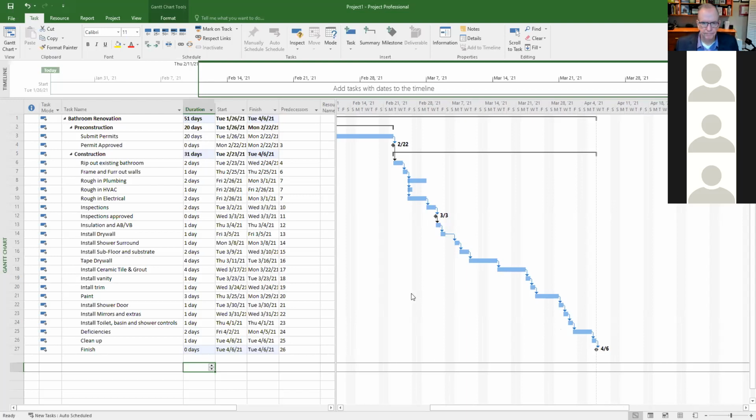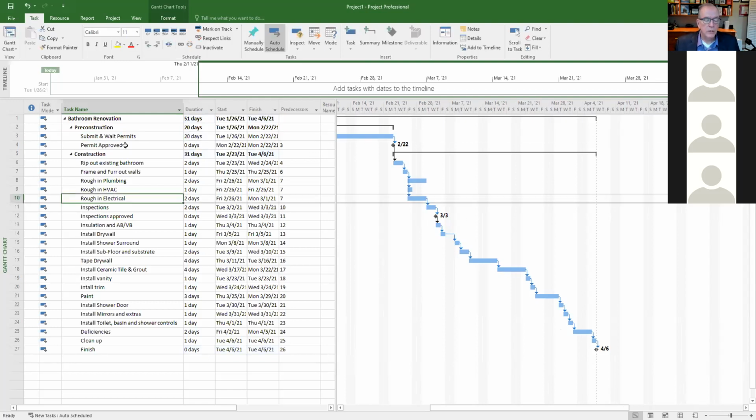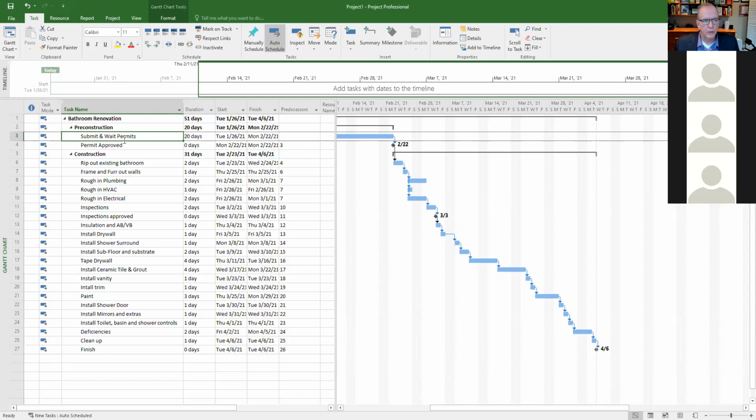Sir, yes. Should the submit permits be 20 days? So maybe I could say submit and wait for permits. Oh, okay, just checking. Yeah, submit and wait for permits. It's good to ask how descriptive your activities are. The activities should be descriptive enough that you know what they mean and that anybody who's going to be reviewing it knows what they mean. So if you're asking me, should it be that, maybe I'm not clear enough. And so then maybe I could make it a little bit clearer. And that's always a good practice.